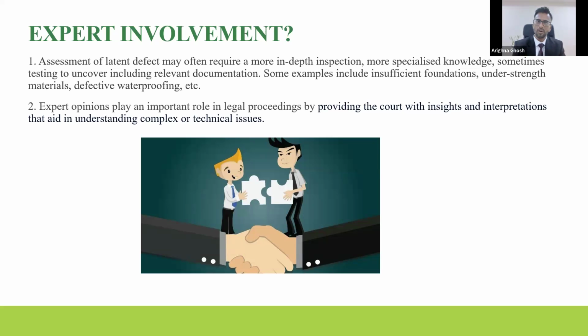Something else I can think of is maintaining a timeline of the documentation. For example, whenever the construction activities are happening, there has to be a record of different types of construction activities. Such documents should be properly maintained. Any maintenance work which has been done in order to rectify that defect should also be recorded properly. Similarly, any effort which has been made to fix that defect internally. So those kinds of documentation records are also essential.